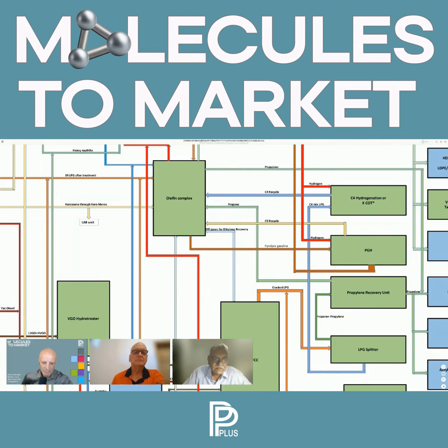So our understanding is if you go for an EPC route, it is neither schedule friendly nor cost effective. Now we have worked out another way where I get the benefits of EPC. Well, EPC has some advantages. I get fast track implementation, single point responsibility. I don't have to bother too much. The owner has a much smaller team of implementation. So there are some advantages associated with it. But time and cost is a penalty.